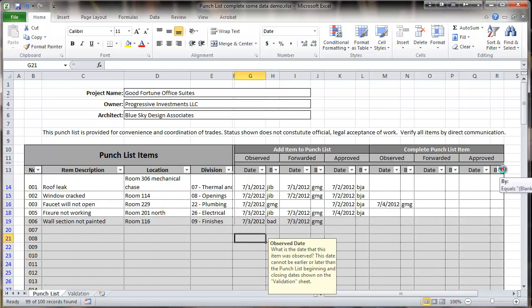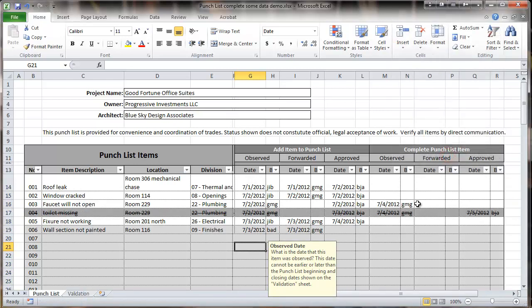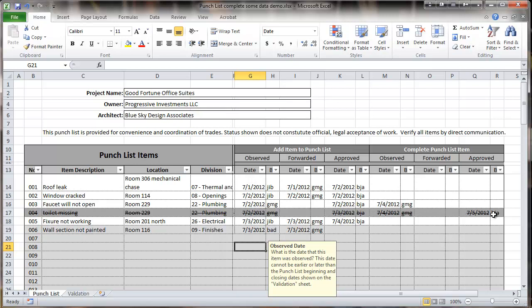There's some additional formatting that's applied. You can see that this item is lined out. Other items are white. There's another one down here which is still gray. So this is one that hasn't been added formally to the punch list because it hasn't received the approval. This is one where the completion of the punch list item has received approval.